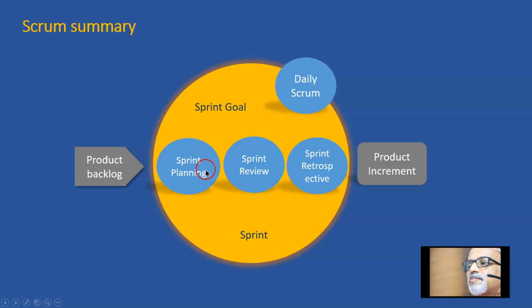So during the sprint planning meeting, he proposes a set of features to be developed. The team clarifies everything, estimates it, decomposes it into tasks, and they decide how to convert that into the final deliverable.